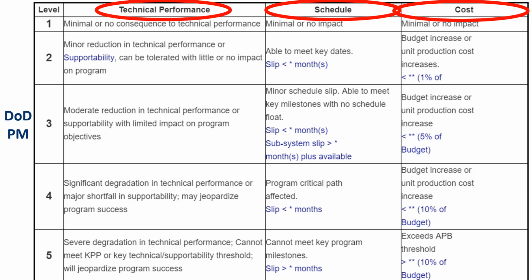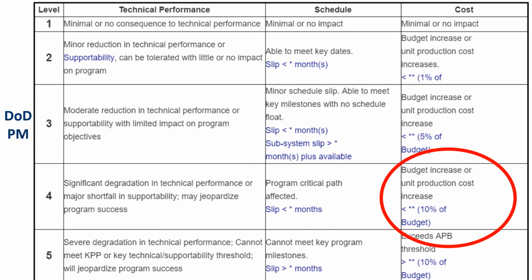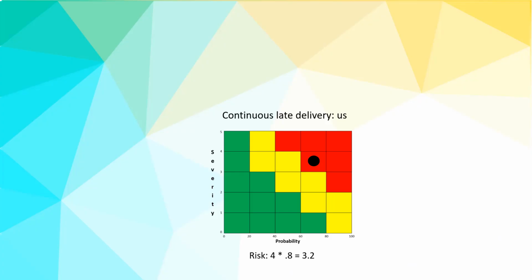In some places, there are entries that must be made by a project manager and guidance is given. Under this level 4 cost, the project manager has to enter in the amount that equals 10% of the project budget that project manager is working on. How in the world do we start to rank things?